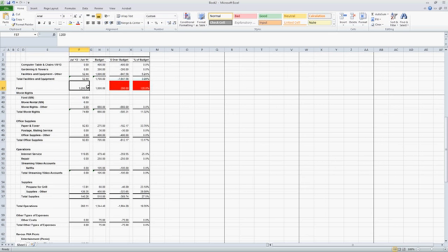If we go back here and enter a different number, say 900, it's saying that we are still under budget, and that's good, but it gives us this warning where it's this pasty tone where we've spent 90% of our budget. So if you run this every month, you can easily tell whether or not you've gone over budget. I'm going to just restore this back to where it was.